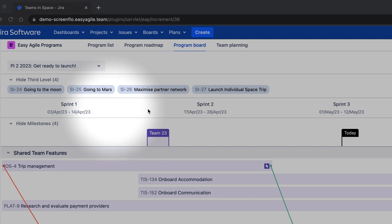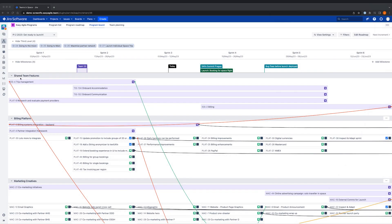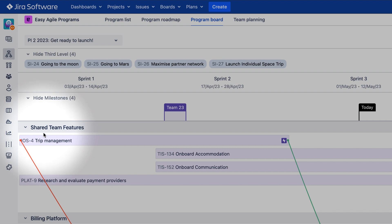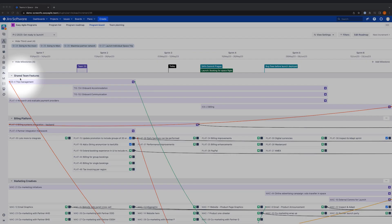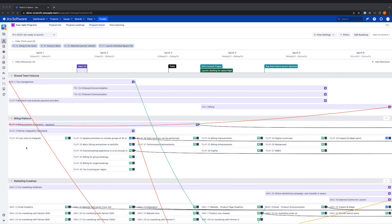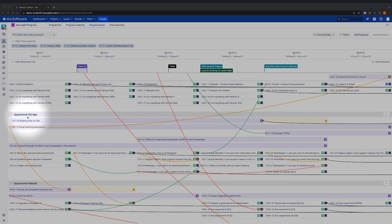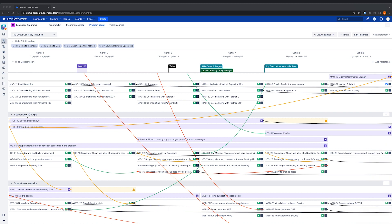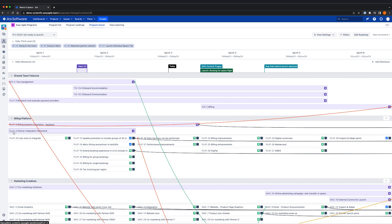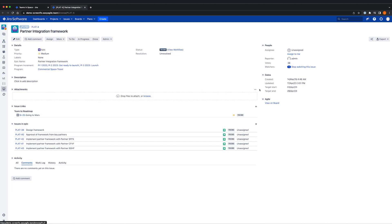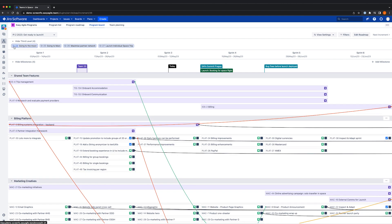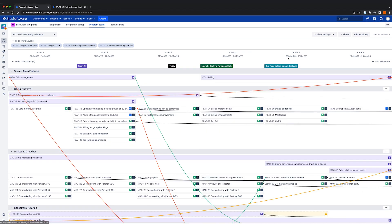Along the top, you can see that we have our sprints and beneath this, the program board is broken up into swim lanes. The first is the shared team feature swim lane, which represents the work shared by more than one team. Each of the swim lanes beneath represent a team that belongs to the program or agile release train. These teams are agile boards in JIRA and they can be scrum or Kanban boards. It's important to note that the issues scheduled here are native JIRA issues. In this view, we have third level issues along the top, which represent higher level priorities and business initiatives that may span more than one increment. Within the team swim lanes, we have features or epics and the option to toggle on team level issues.